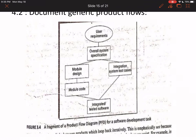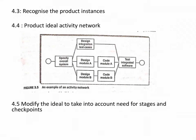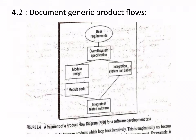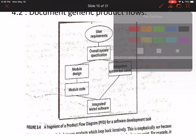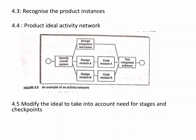Step 4.3: recognize product instances. There may be many instances leading to one product. In a generalized form a product looks simple, but in real time there can be many instances or intermediate stages leading to the same product. You have to take those instances into consideration and plan accordingly. Step 4.4: create a product/activity network.